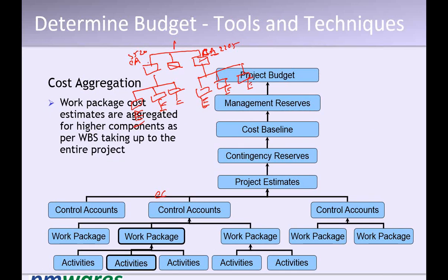This is one segment of the WBS. This is the other segment of the WBS. I have put a control account against this, 2205. Here it is control account 5520. Now, total budget of $50. I have given $30 here and $20 here. This is how it is budgeted, right?